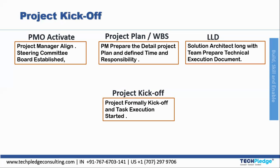After that comes the Low-Level Design (LLD) phase, where a solution architect along with the team prepares the technical execution document covering all the technical steps to be performed. Then comes the formal project kickoff phase where all task executions are started.